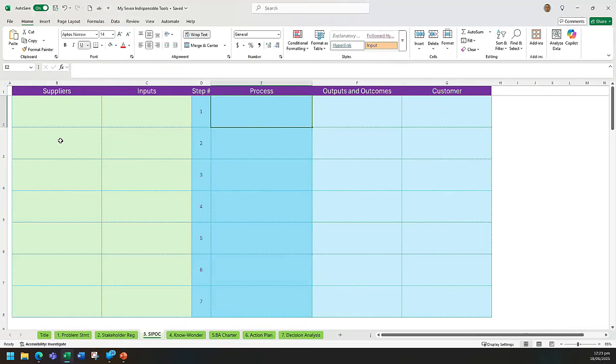So it's really quick to fill out. The other thing I've been doing more recently with these: this is for a process, and if I was ever going to do a swim lane or something like that, I'd probably try and do something like this first, just to get that high level view and understand who's involved and what's being produced. And then I'd go to the next level of detail for the swim lane.